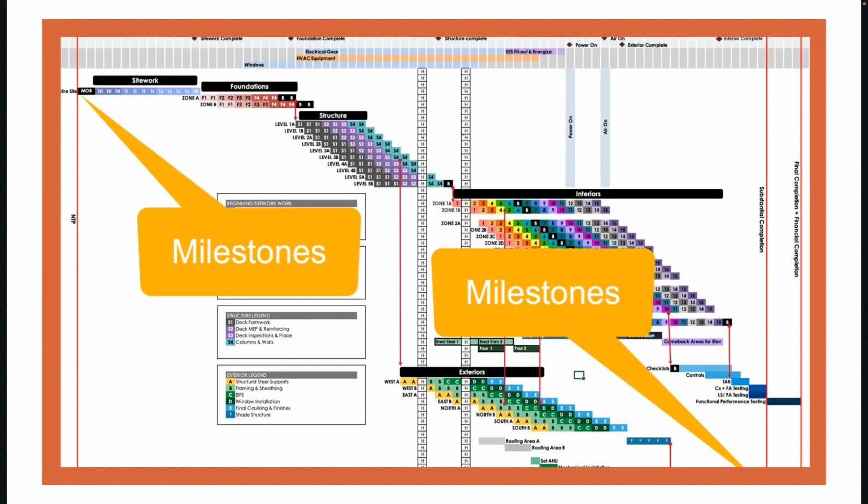You have a temporary certificate of occupancy, or C of O, actually in some authorities having jurisdiction, right, in some regions. And you probably have a preliminary balancing report and you still have to do building flush and functional performance testing, right? So there's a number of requirements for this, but this is when the owner can start moving in while the contractor is finishing the building flush, functional performance testing, and the punch list.